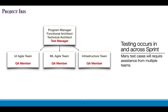Testing is a critical component in an integrated system like this. The UI team can test its user interface, and the machine learning team can test if its model is working correctly. But the system is a sum of its parts. The recommendation is for the program to have an overall test manager who manages coordination for the final system test and user acceptance. That test manager will have a consolidated set of test requirements and test scripts, make assignments to individual teams, track the test, and in coordination with the Agile teams, determine if testing is complete.